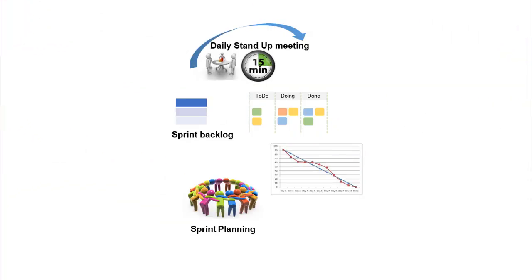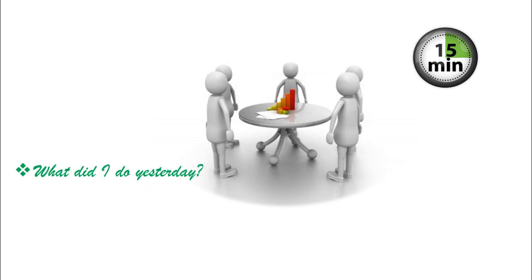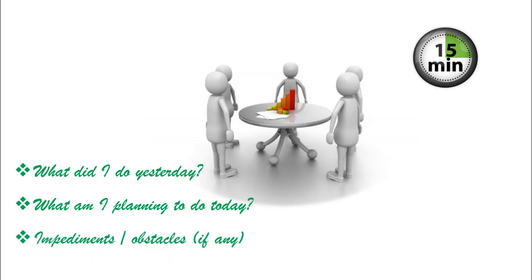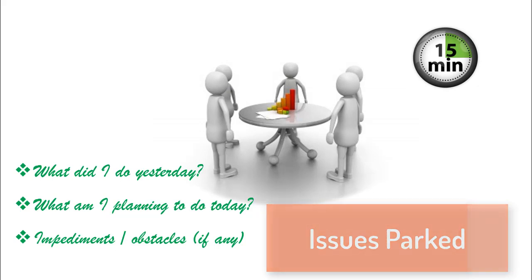Now the question is when and how the team is updated when such things are discovered. The solution is every day the team members meet for around 15 minutes. The idea is to update each other about whatever is happening in the project. In this meeting, every team member speaks on three points: what did I do yesterday, what am I planning to do today, and impediments if any. The minutes of meeting are not noted. The obstacles, if any, are parked and not solved in this meeting. The scrum master may call for another meeting, calling only the required people who can solve the problem.